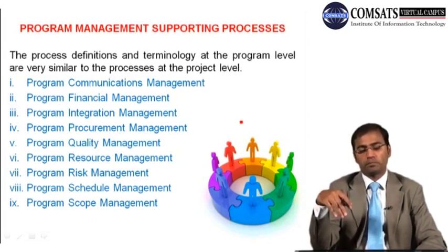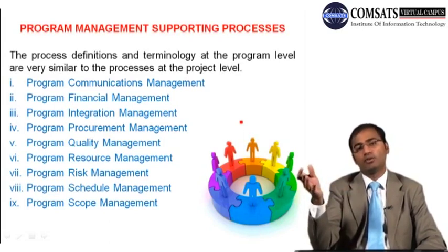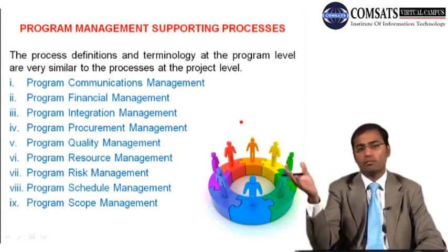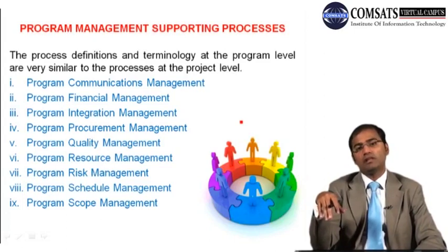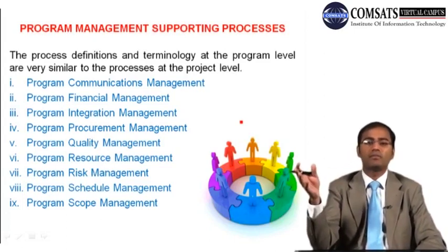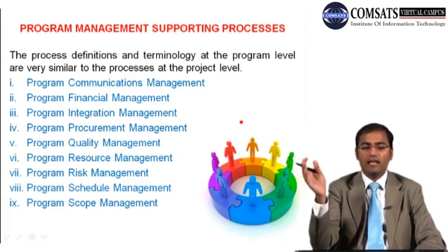Why have they identified those risks now, when they have completed 30% of the project? Because the visibility has enhanced, the level of information has enhanced. So that's why they can actually identify more risks.